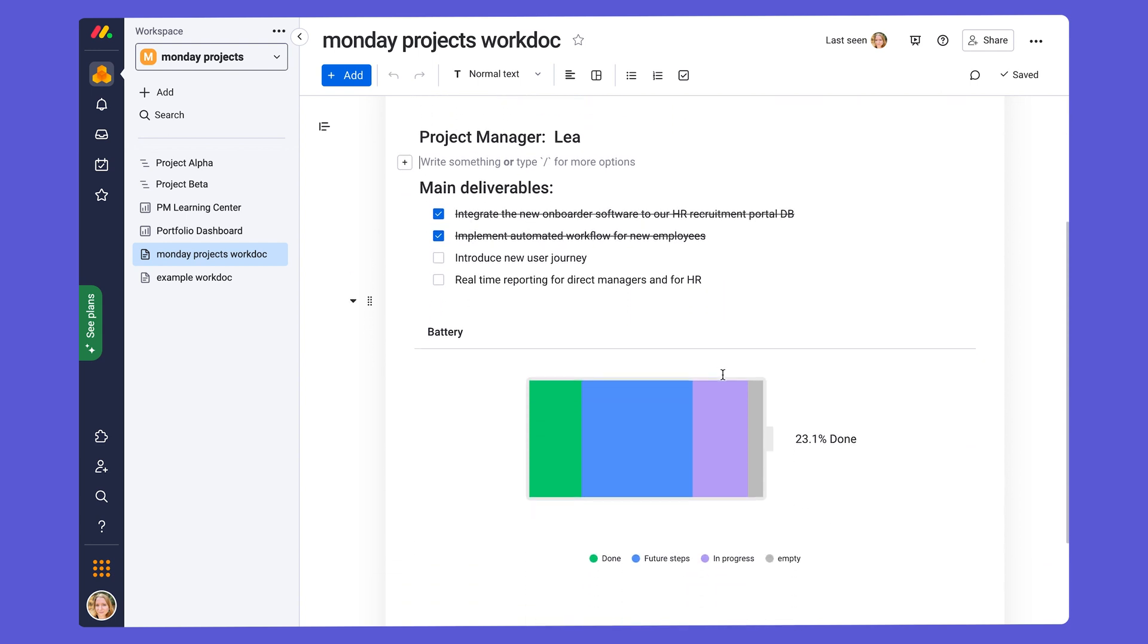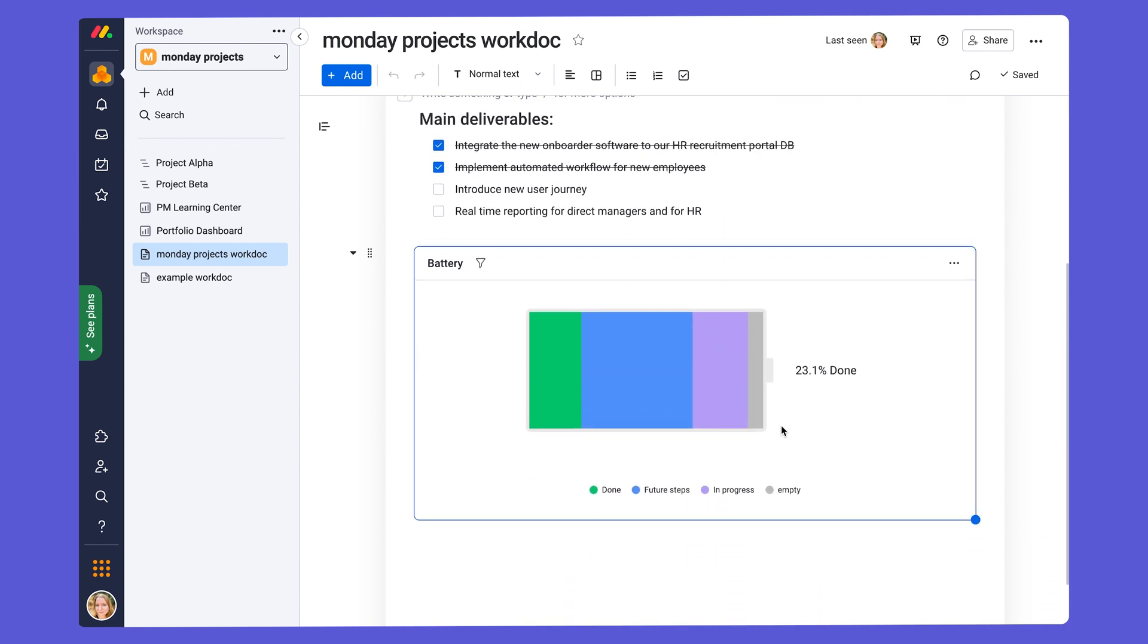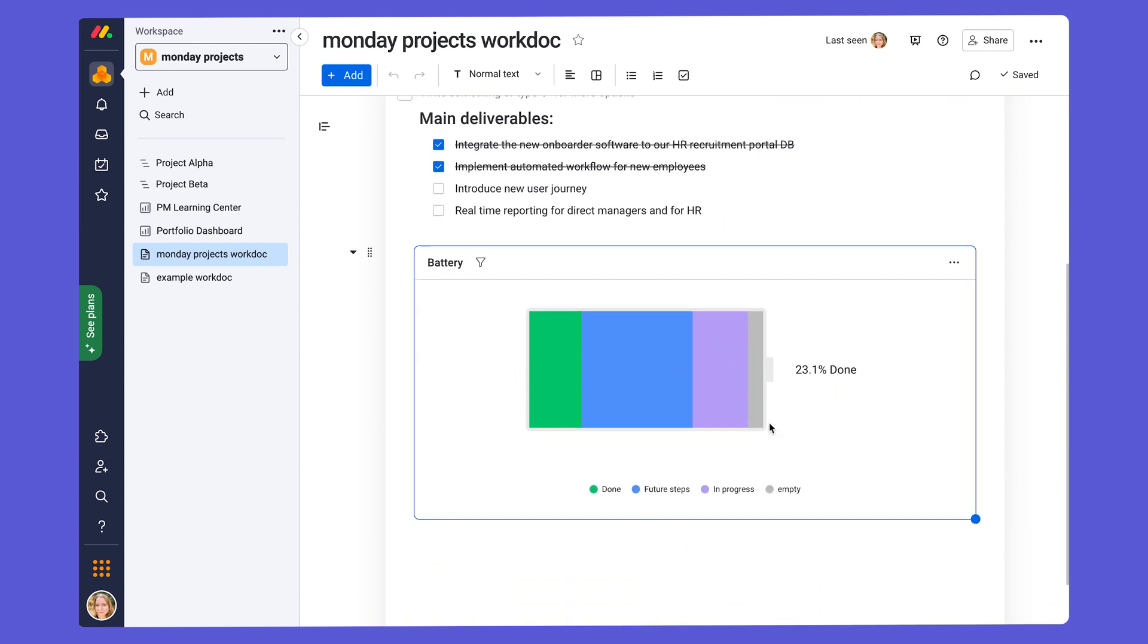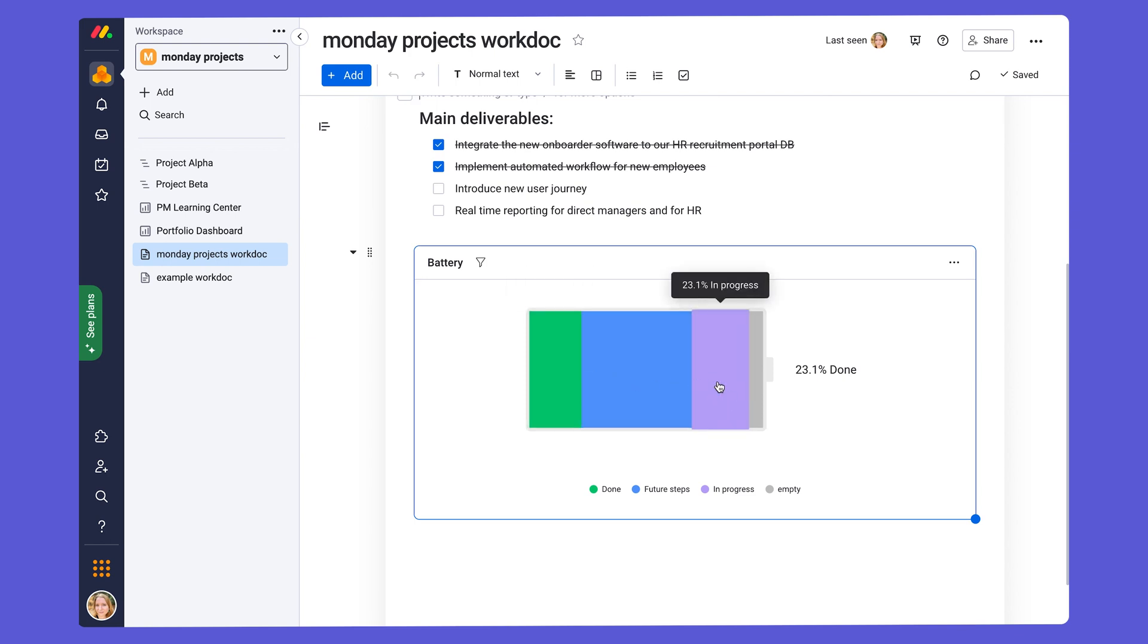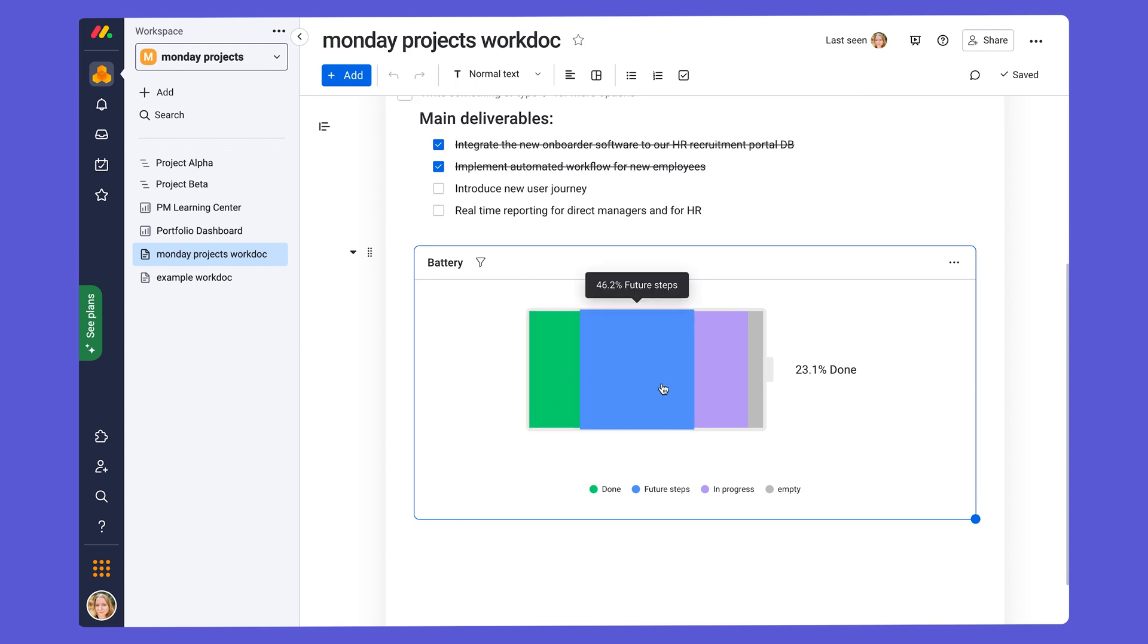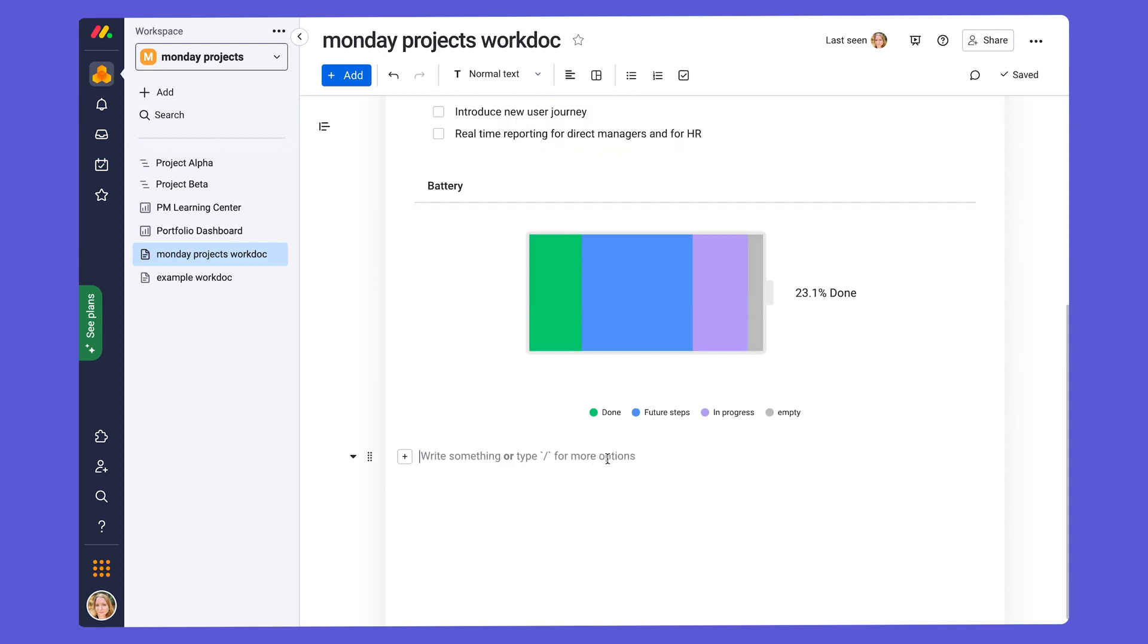Right here, if we scroll down, we've added a battery widget, and this incorporates the statuses from project beta right into the WorkDoc. So we can see what tasks are done, still being worked on, or still in the future, for instance. Every component is automatically synced and updated as you work, so it'll always show live data. This is going to make creating project reports a lot easier because if something changes in the data that's being reported on, it will automatically sync to the WorkDoc too.